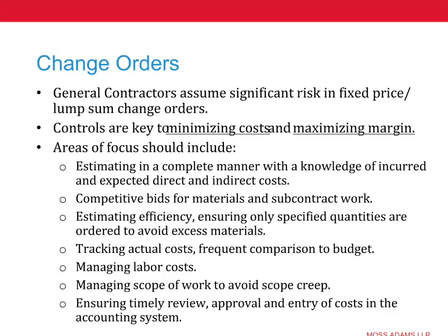What happens sometimes is both parties agree to proceed with the work, and they never really address that underlying issue of the change order and how it should be priced. And then maybe a year later, when they're trying to close the contract, those issues really come up. And having not dealt with it timely, it becomes a real problem at the end of a project. So